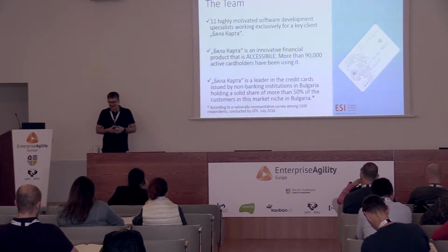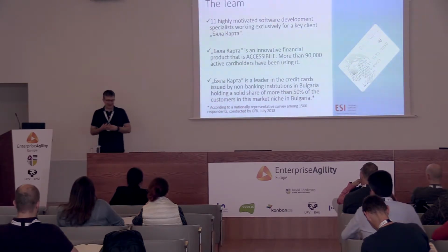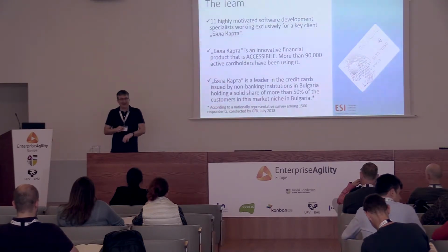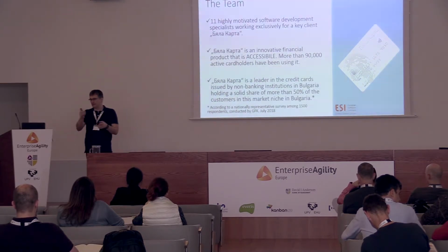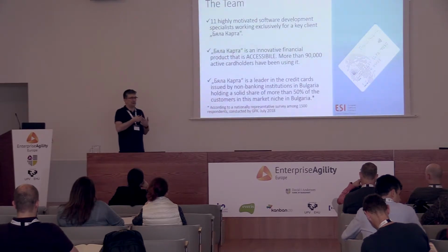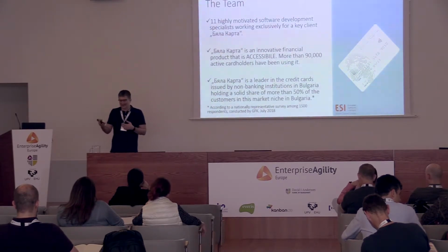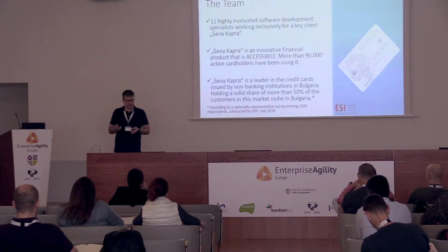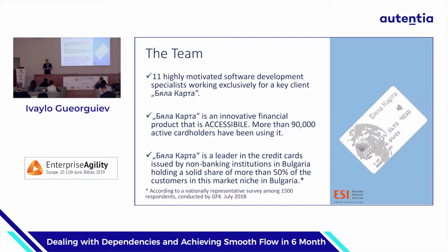So they created a very comprehensive backlog using Excel, in which they put all the requirements by the client, and they put a lot of notes. They put risk. They put how they plan to work with the ICT, what type of security it needs, and so on.